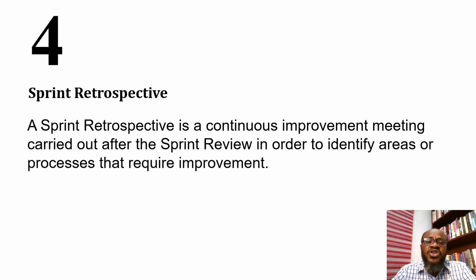Now, the team can use templates to perform this exercise. Templates like, what should we start doing? Why should we start doing that? What should we stop doing? Why should we stop doing that? And what should we continue doing? And why should we continue doing that?